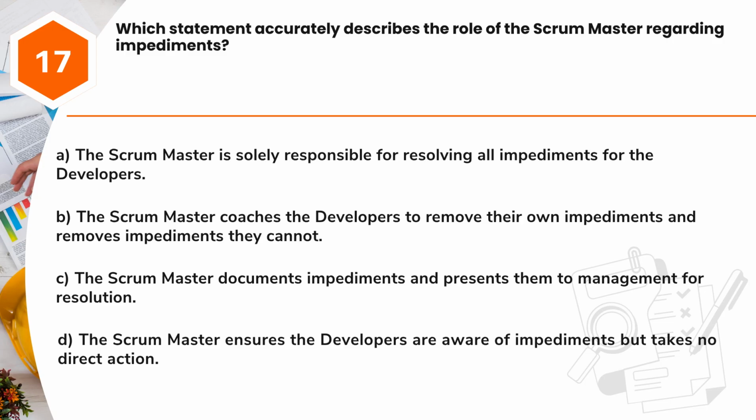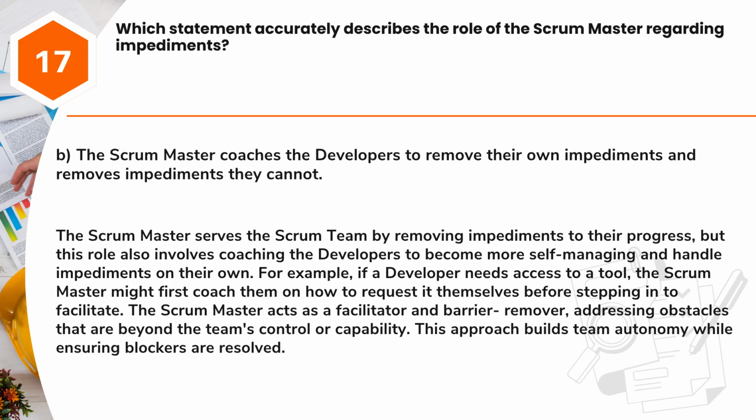Answer: B. The Scrum Master coaches the developers to remove their own impediments and removes impediments they cannot. The Scrum Master serves the Scrum team by removing impediments to their progress, but this role also involves coaching the developers to become more self-managing and handle impediments on their own.